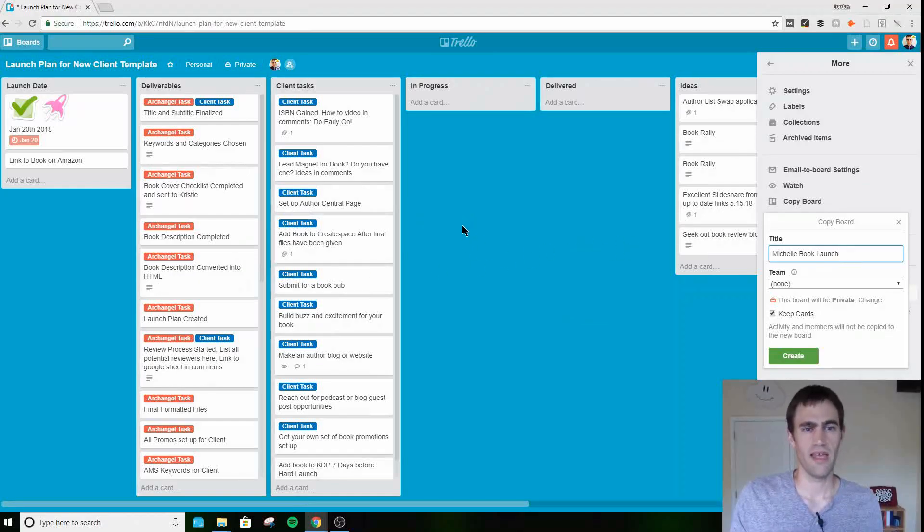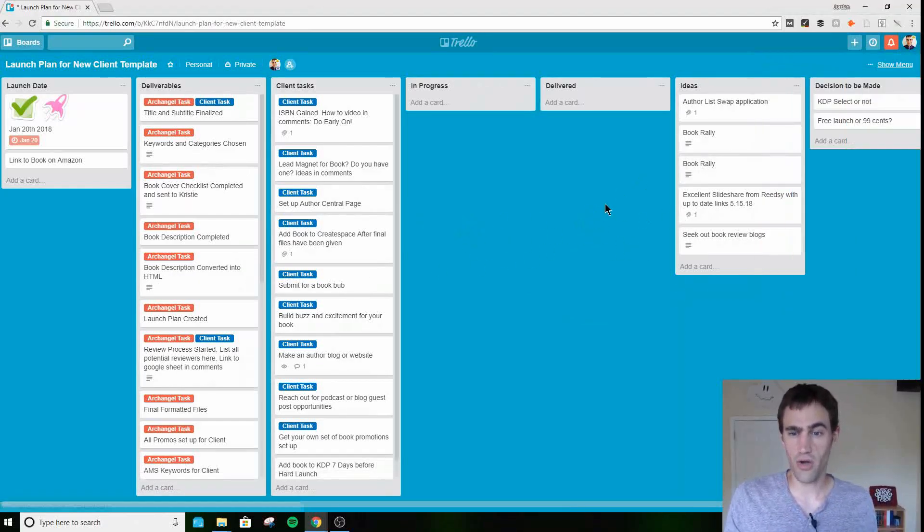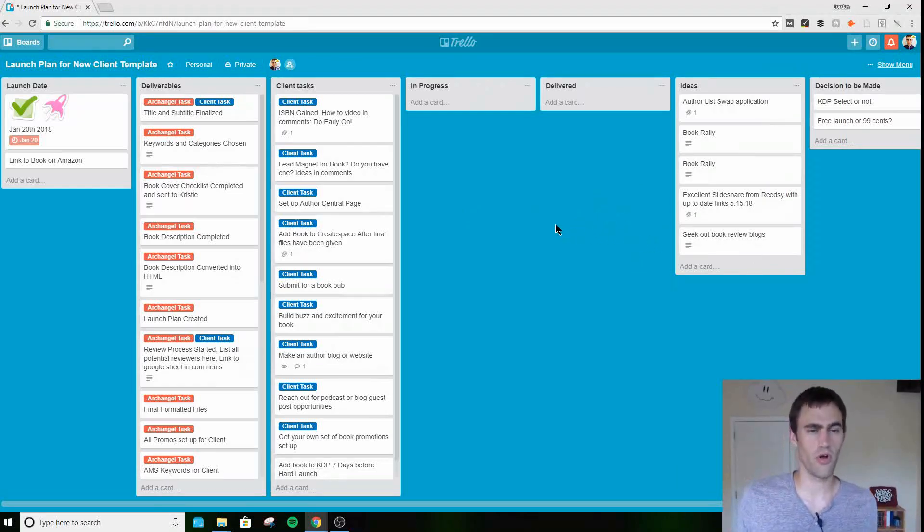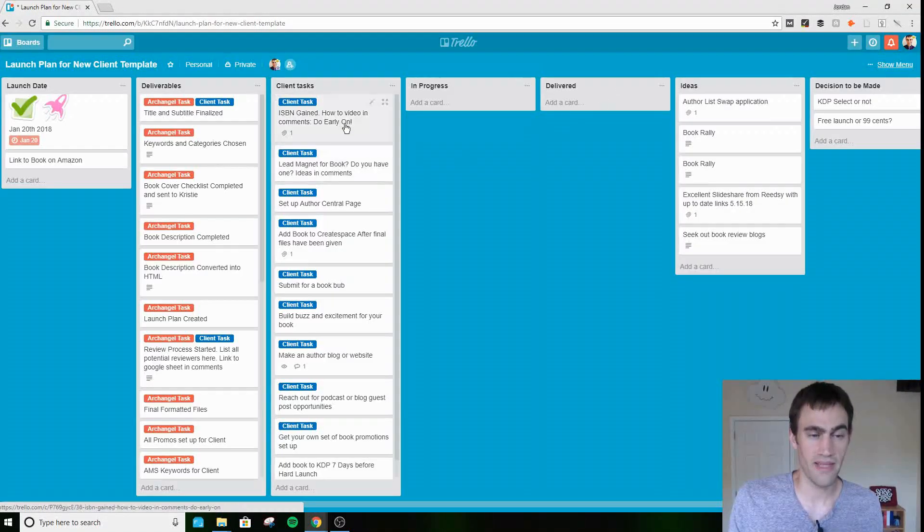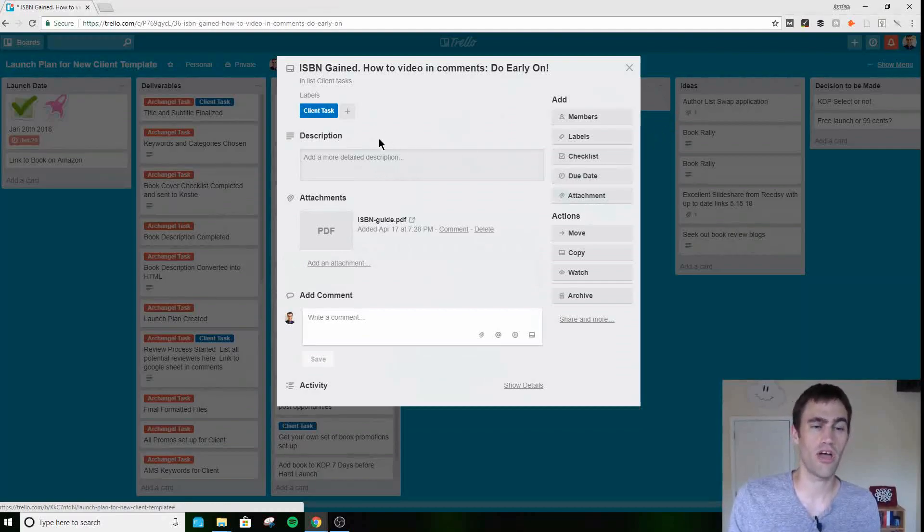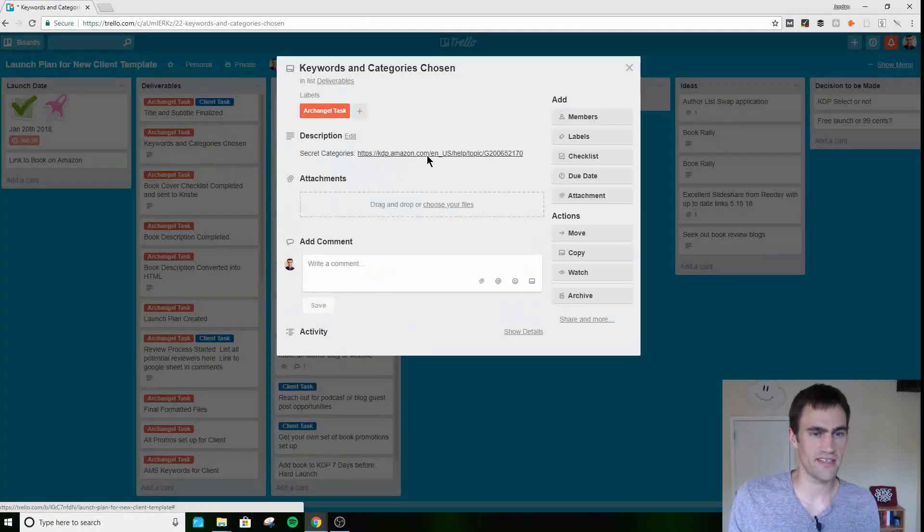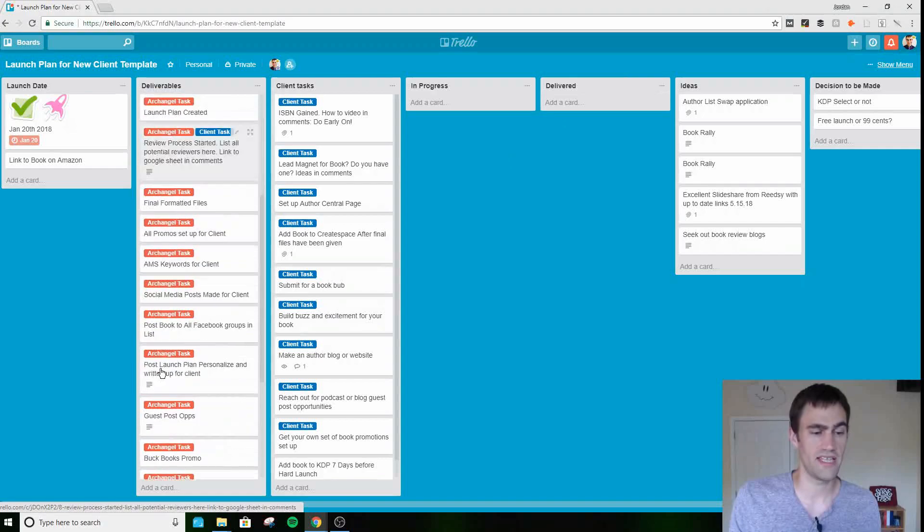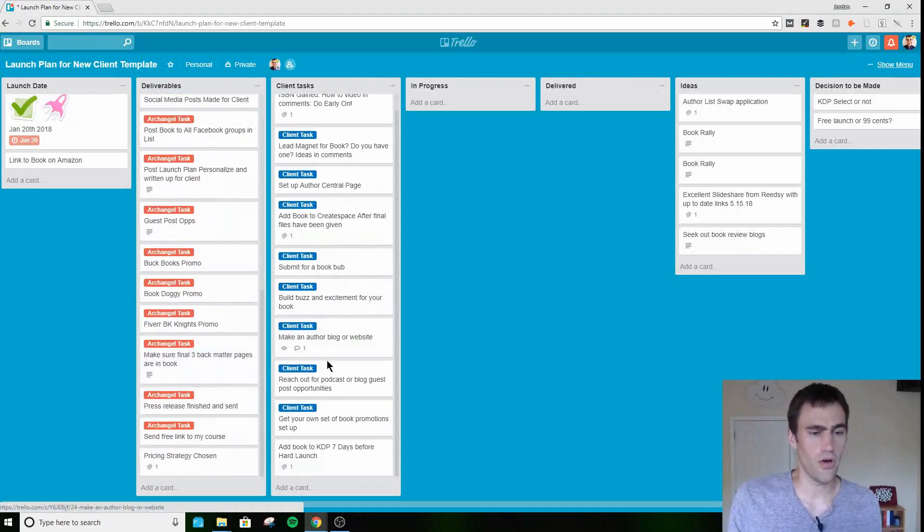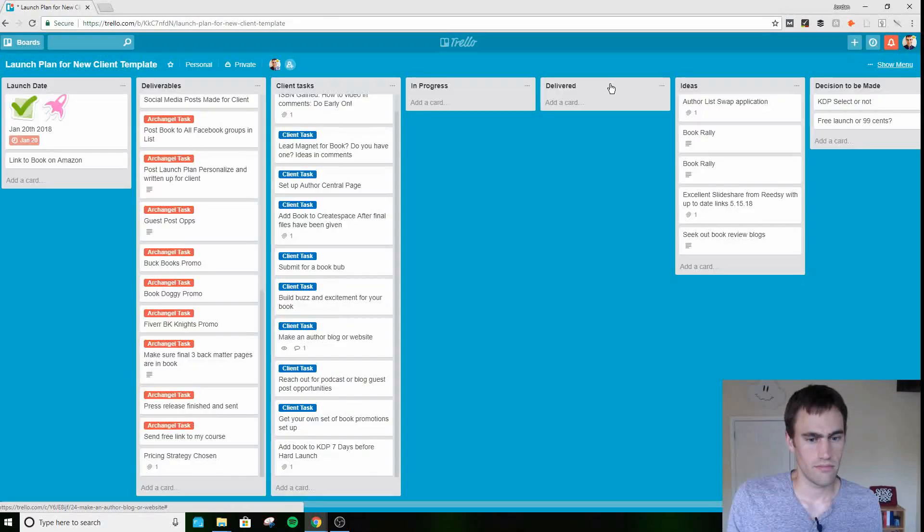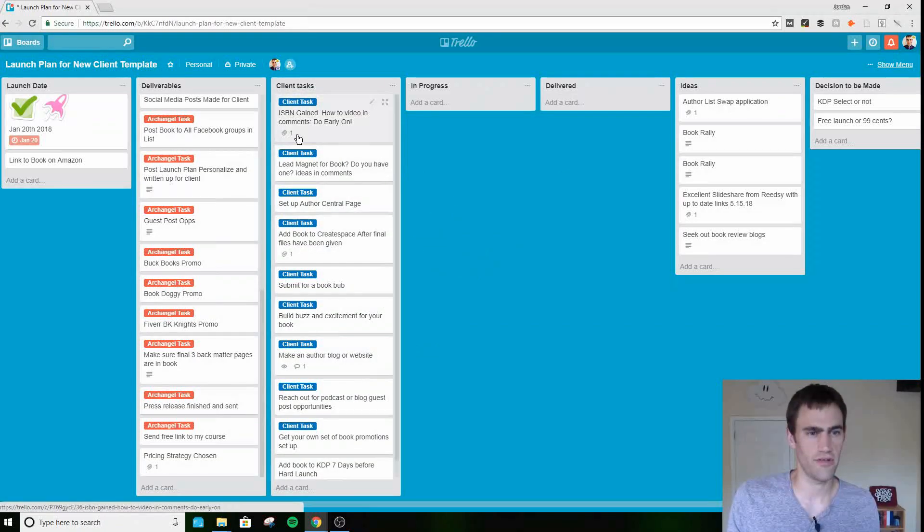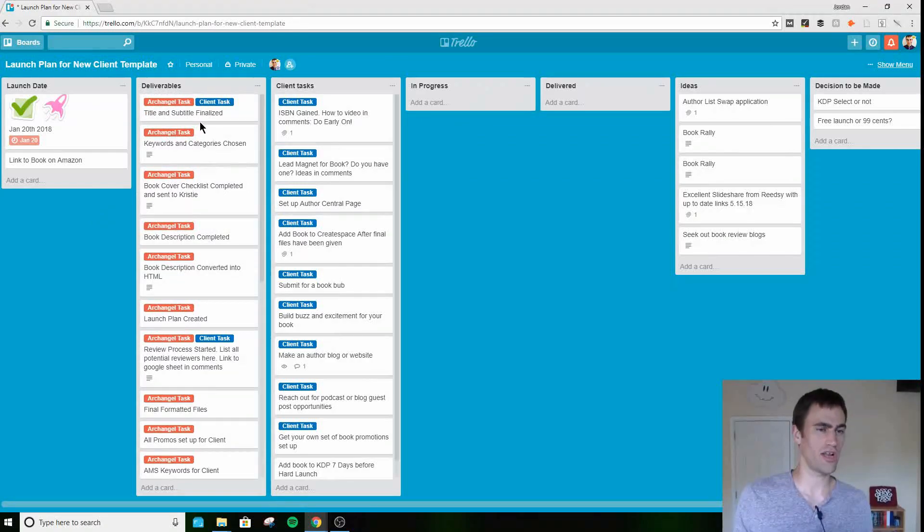It would keep the cards where they are, it would keep the attachments and the descriptions and stuff and all of that. Important to note though, if you're gonna utilize a board like that that you're going to be able to then copy from over and over, make sure you're not putting anything in the comments, because as of right now there's no way to copy the comments on a card. But it will copy the attachments and it will copy the descriptions. So whenever you're adding something, just make sure something is up here in the descriptions, not as a comment to that card.